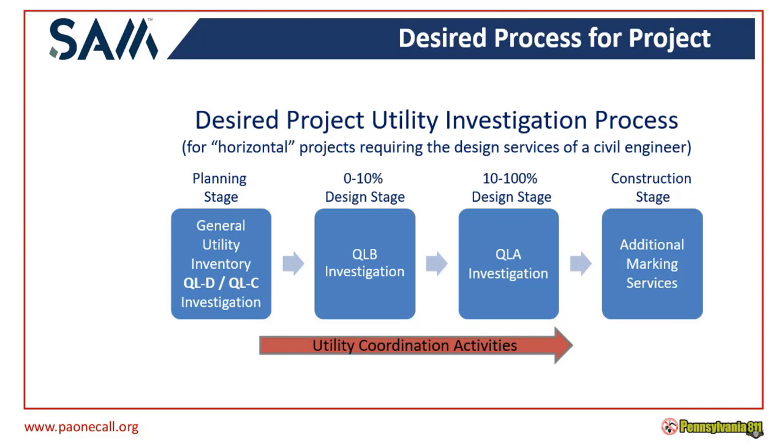Again, in the design stage, that's when you also want to utilize the QLA. This is going to help you maybe get those depths that you need. One of the other things I do want to bring up is if you're boring underneath a road, you might utilize this QLA in the design stage to make sure that, hey, you get that information to the borers that they have to go under or go above certain depths. So that way they don't run into any utilities.